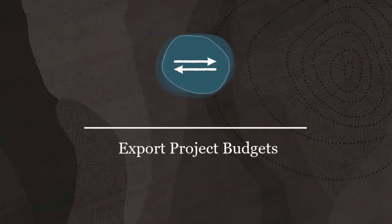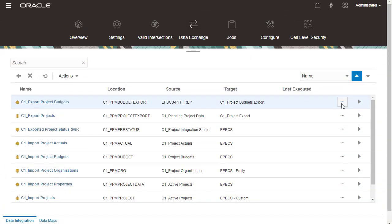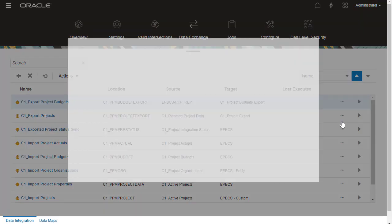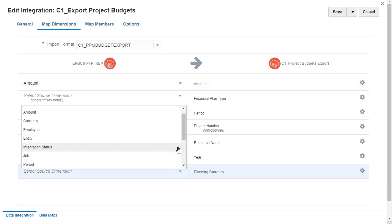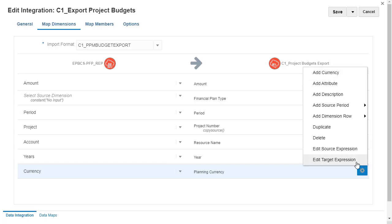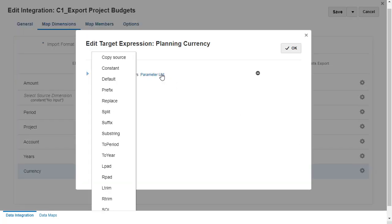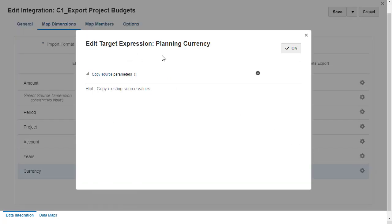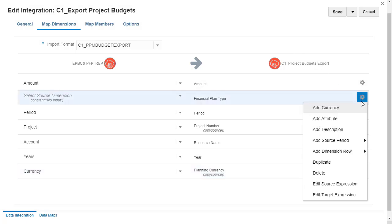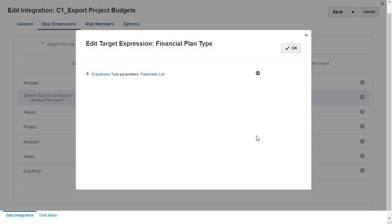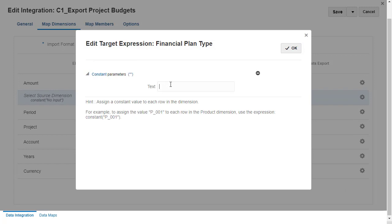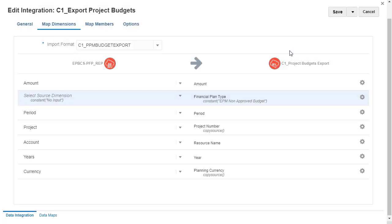Export Project Budgets. For Export Project Budgets, we'll start by mapping dimensions. Map the currency source dimension to the target Planning Currency dimension. To copy existing source values, I'll add the Copy Source target expression. Map the Financial plan type. You define the Financial plan type in Project Management. This determines how budgets will be defined when pulled from EPM Planning.